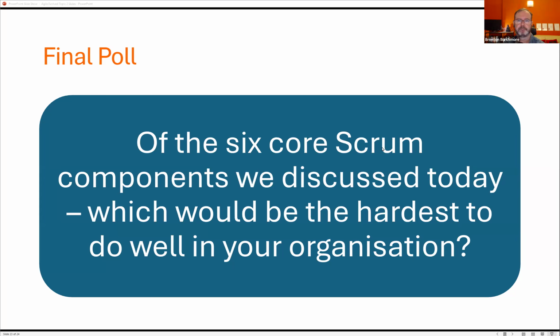Yeah. A couple of questions on product backlog. Should it be ready before you start? And is it a sprint 0 activity, or is it something that's built out with a product spec? I've usually seen it as a sprint 0 activity, where you don't have every user story refined before you start. You can't. It's not feasible. You need, in my experience, at least 2 or 3 sprints worth of reasonably well-refined user stories to be able to say, okay, these are the ones we're going to look at right now.